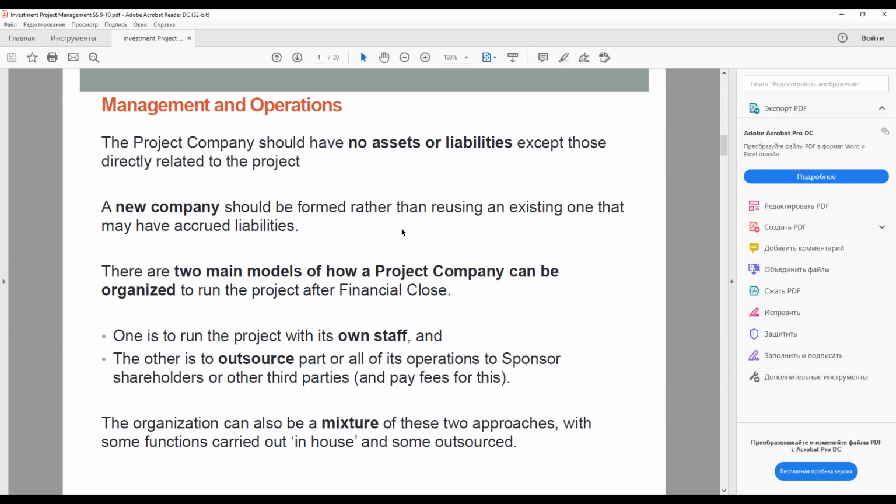A support service agreement with one or more of the sponsors with relevant operating experience to provide the project company with backup technical support, spare parts, etc., may also provide some reassurance to lenders, even though one might expect that the sponsors will provide technical and operating support to protect the investment anyway. Because a support service agreement should not cost anything unless support is actually required, there is no reason for the project company not to sign one if the lenders feel it to be necessary.